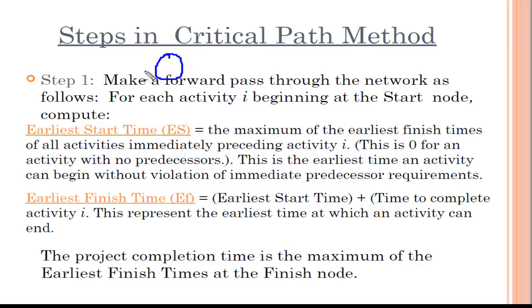You have an activity. When is this activity going to finish? Say this is my activity and this is its predecessor activity, and I want to know when this activity will finish. Definitely it will depend on when the activity has started, its earliest start time, and how much time it's going to take.